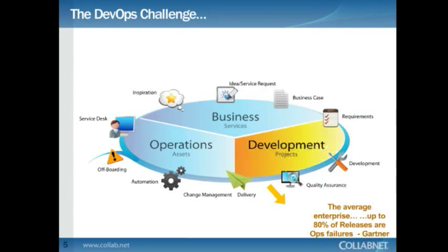But when you look at the project management piece, even with the best quality processes in place, you typically have a real challenge in getting those innovative ideas rolled out to IT operations in a way that is going to benefit the business. Again, Gartner tells us that it is not unusual to find that 80% of a well-tested, well-developed, policy adhered to project, when it gets introduced, will cause failures of one kind or another for the ops teams.